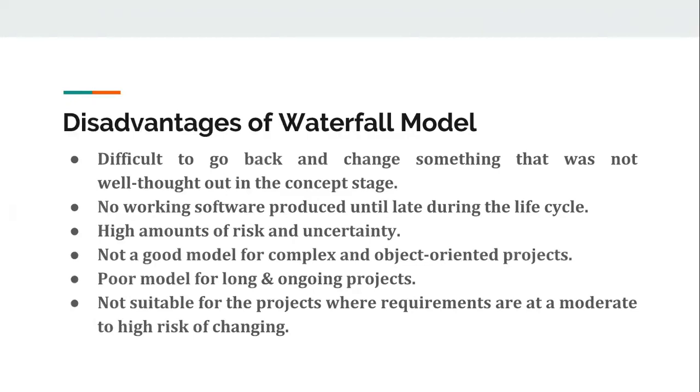In a waterfall model, very little customer interaction is involved during the development of the product. Only when the product is ready can it be demoed to the end user. When the product is developed, if any failure occurs, then the cost of fixing such issues is very high because we need to update everything, from the documents to the end of the logic.